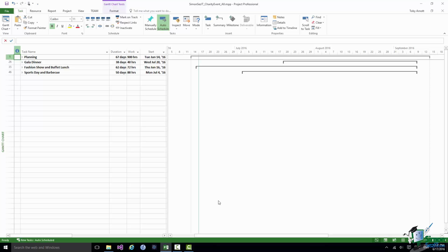The best way will always depend on the particular circumstances that you're in, but some of the tools and techniques that you'll see here will be useful to you, and then as we go through the next few sections hopefully you'll see some improvements that you can make to the way that you do this. But as I said earlier on in the section, one of the key things here is that the earlier in the process you can do this, the better. You're more likely to save yourself time and effort if you split a program into separate projects as early on as possible. So first of all, let me create an empty blank project using the keyboard shortcut Control N.